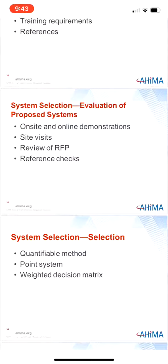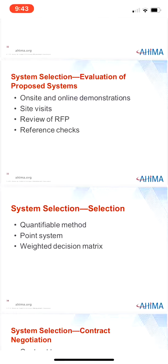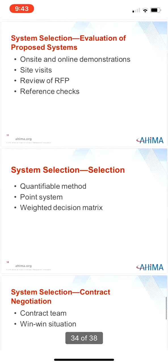The vendor spends a lot of time responding to an RFP, so the RFP should only be sent to vendors who are seriously being considered. The number of RFPs submitted is typically limited to 3-5 vendors. The vendor's proposal should be received by a designated person, generally the project manager, who then coordinates the review of proposals. The healthcare facility also spends hours reviewing the RFP responses — for major information system purchases, the responses could fill a 3-4 inch binder. A spreadsheet is frequently developed to assist the analysis of the RFP.